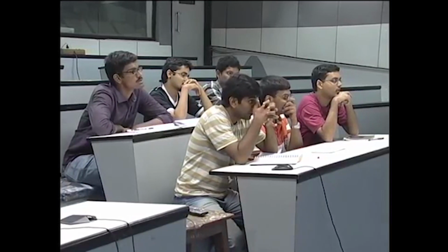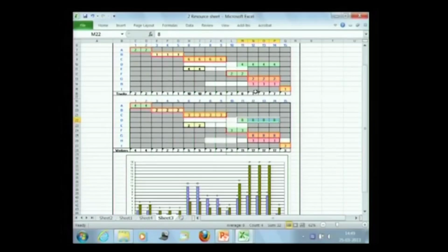Right now they are not necessarily related. For example, some tasks might require 4 workers to load up a truck, another might require just a backhoe or a forklift operator, you might just need one, depending on the material or what you are using. So right now we are assuming there is no real relationship, but you have seen the problem I am bringing up: with 2 resources, resolving the over allocation of one now causes over allocation of the other.